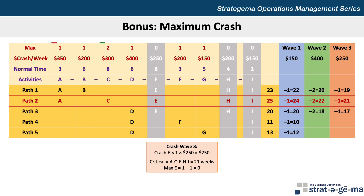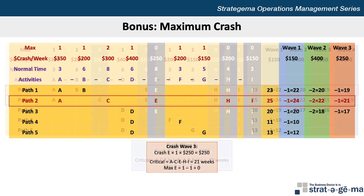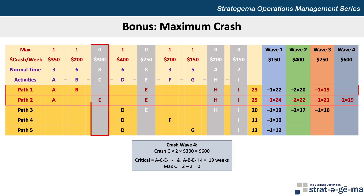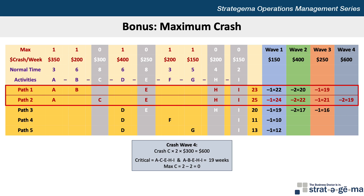To keep going, we look at the critical path again and choose between A and C. We can crash activity A by one week at a cost of $350 or C by two weeks at a cost of $300 per week. C is the least expensive and we can crash it by two weeks, so we subtract 2 weeks off each path containing activity C, which is only path 2. This brings path 2 down to 19 weeks, and activity C can no longer be crashed. But something interesting has happened — notice now that we have two critical paths, path 1 and path 2, both at 19 weeks. We could have crashed activity A by one week instead, and path 2 would remain critical, but our objective is to knock off as many weeks as we can during each crashing wave.